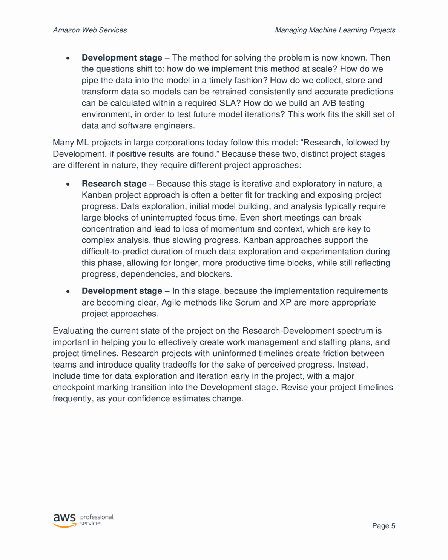Evaluating the current state of the project on the research development spectrum is important in helping you to effectively create work management and staffing plans, and project timelines. Research projects with uninformed timelines create friction between teams and introduce quality trade-offs for the sake of perceived progress. Instead, include time for data exploration and iteration early in the project, with a major checkpoint marking transition into the development stage. Revise your project timelines frequently, as your confidence estimates change.